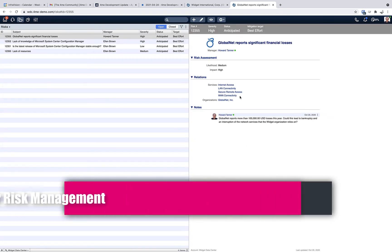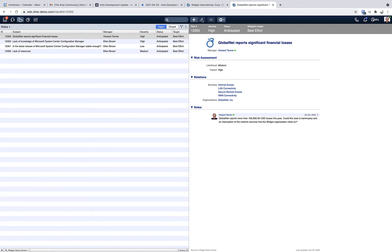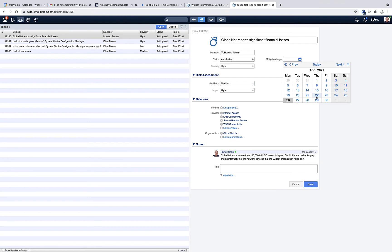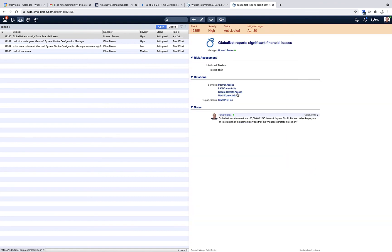The next update is a new field in the risk record. When you go to risks, select a risk and open it in edit mode, you will see that there is now a mitigation target field which you can populate with a certain date. That helps you in planning and prioritizing the mitigation of risks. As soon as you populate this field, 4me is also providing color coding to indicate whether or not the mitigation target is near or maybe even already passed.